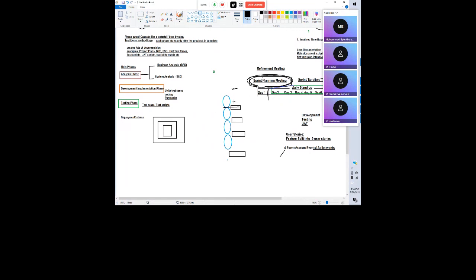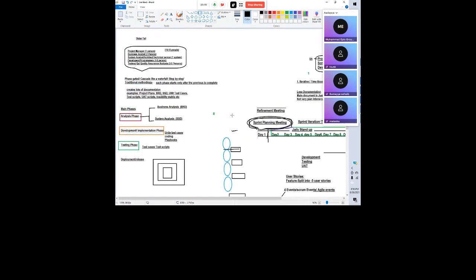While here, every 2 weeks we can see what functionality has been built, and if the stakeholder doesn't like it, there's not a huge loss because it's just 2 weeks. They can fix it. But after 9 months, if they asked for a motorbike and they got a tricycle, fixing the tricycle into a motorbike will take a lot more time and money. Okay, so these are the different advantages and disadvantages of using a methodology.